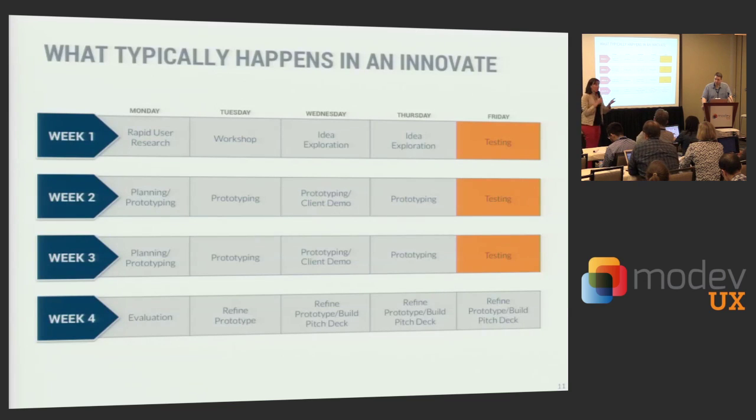So this is more, and I should probably tell you, as I was looking, my question I would ask is, what do the teams look like? So typically, these are teams of 2 to 3. It'd be a product manager, a UX person, and maybe a UX engineer like Erik who's building the prototype. So the UX designer and the prototyper would probably be allocated pretty close to 100%, and then the product manager would come in or out. And I come in and out depending on where the engagement is. So it's really a small team for a fixed amount of time.